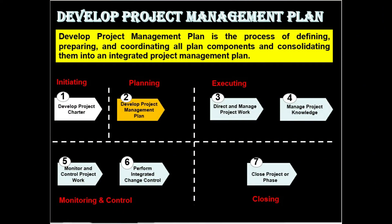It is the second process in the project integration management and it is defined as: developed project management plan is the process of defining, preparing, and coordinating all the plan components and consolidating them into an integrated project management plan. The key benefit of this process is the production of a comprehensive document that defines the basis of all the project work and how the work will be performed.